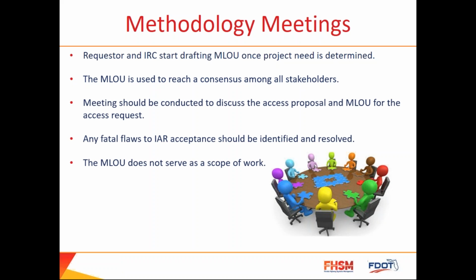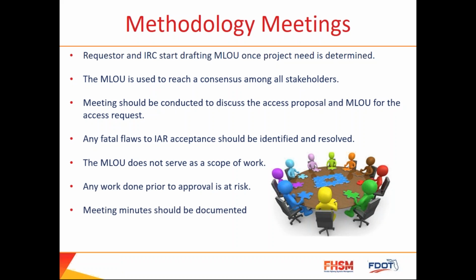The MLOU does not serve as a scope of work for the project. Any work done prior to the approval is at risk. All meeting minutes should be documented, and we have an MLOU template for you to use when developing this document. It is included on our website as well as on the link included on this slide.